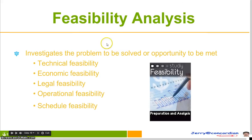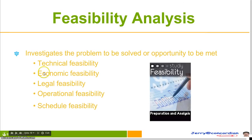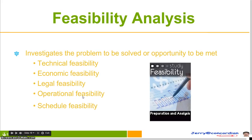Before planning a new system, we have to do a feasibility study. Feasibility analysis has five parts. First, technical feasibility is concerned with whether hardware or software can be acquired or developed to solve the problem. Second, economic feasibility determines if the project makes financial sense. Third, legal feasibility determines whether laws or regulations may prevent or limit a system development project. Fourth, operational feasibility measures whether or not the project can be put into action. Fifth, schedule feasibility determines if the project can be completed in a reasonable amount of time.